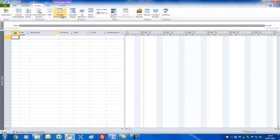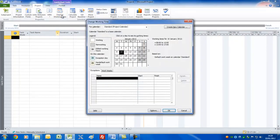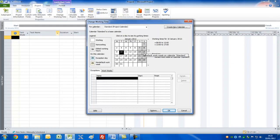The next step is to set up your project calendar. We stay on the Project menu and go to Change Working Time. For small simple projects there's no reason to change this. By default the project starts at 8 o'clock in the morning, goes through to 12 o'clock — four hours work — takes an hour off for lunch, then does four hours in the afternoon bringing you to 17:00 or five o'clock.